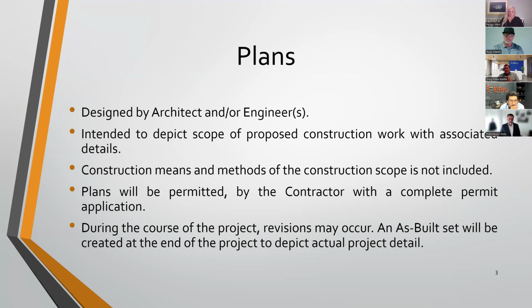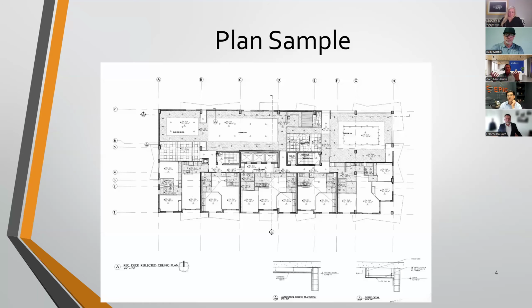But ideally, it is a dance between the owner, the engineer, and the contractor in what we refer to as the pre-construction phases of the project. And those plans that Ben is showing you are actually contractual documents and become part of the construction contract and are referenced in the agreement between the contractor and the owner during the negotiation process when you're actually signing up to kick off construction.